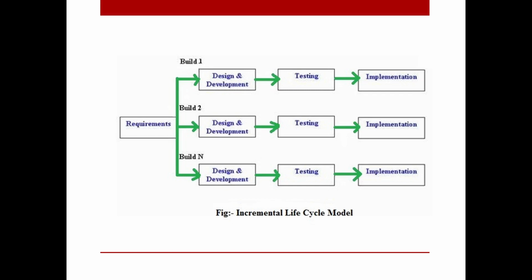There are a few advantages why the incremental model is used. First, the client gets important functionality early. It generates working software quickly and early during the software lifecycle. The model is flexible and less costly to change scope and requirements. It is easier to test and debug during small iterations. In this model, the customer can respond to each build. It lowers initial delivery cost. It is also easy to manage risk because risky pieces are identified and handled during its iteration.